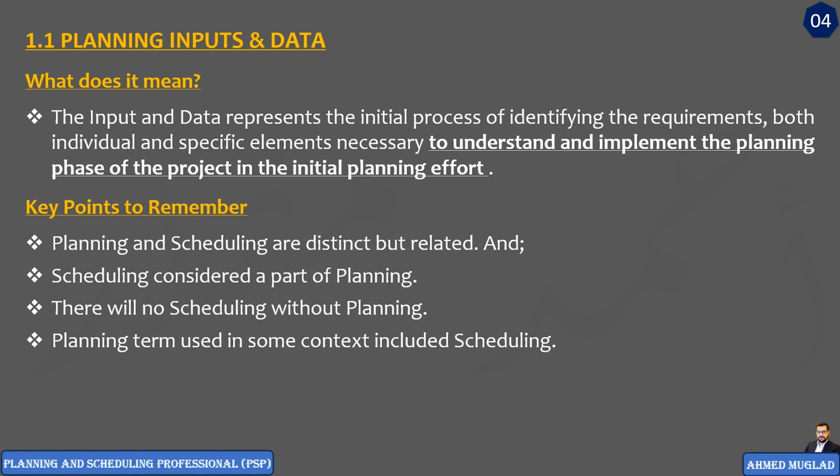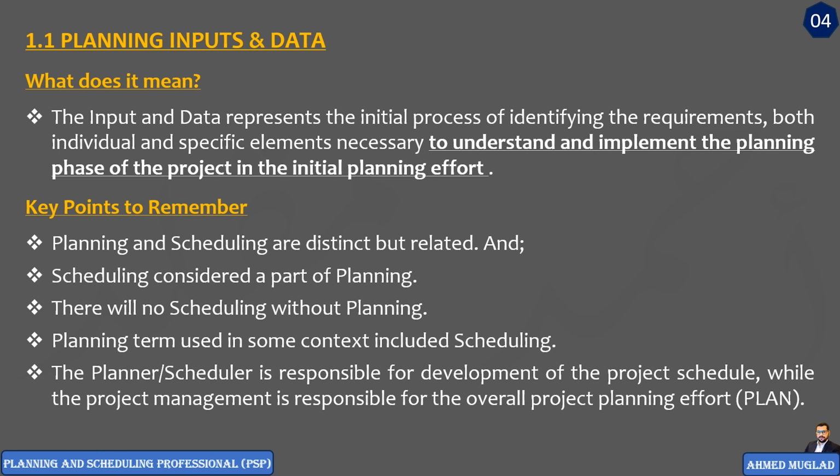And that is why sometimes, generally, when we say planning, we mean the planning phase or all planning and scheduling effort in the project. The planner is responsible for the development of the project schedule, while the project management is responsible for the overall project planning effort. Overall planning effort means the project plan. So the planner is usually not responsible for the project plan. He or she would be responsible only for the part of the project schedule.